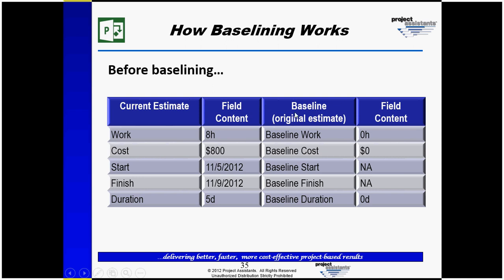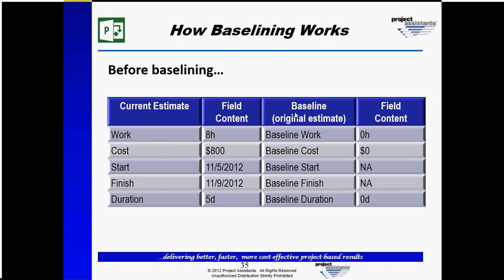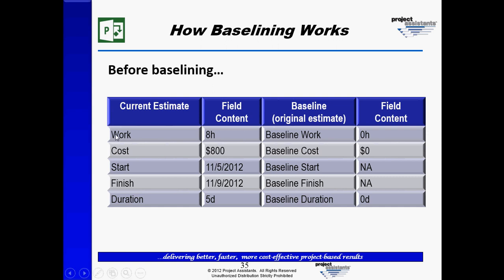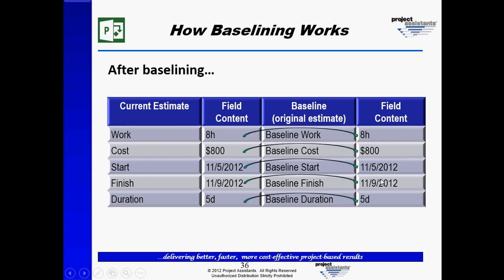There are five fields in Microsoft Project that are used for tracking estimates: work, cost, start, finish, and duration. When we baseline our plan, these fields are copied over from the current estimate to the baseline estimate.